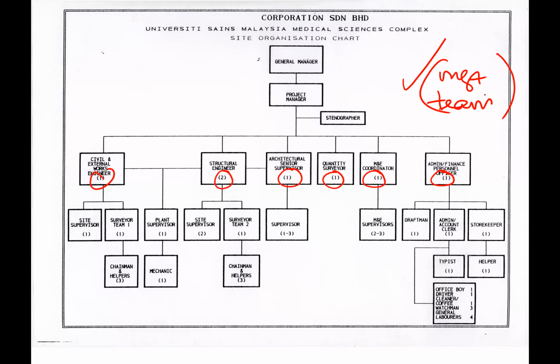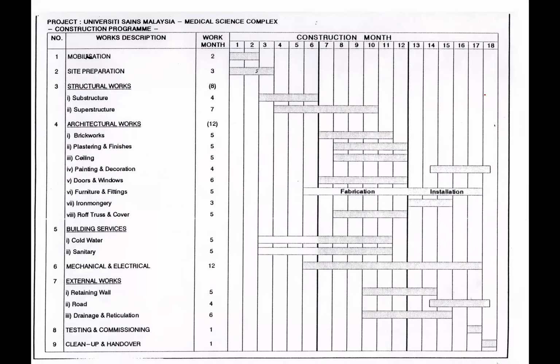Normally, management team and workers, we do separate them. Management team is not many. Normally in any construction site it could be less than 10%. Okay, the rest are the construction workers. So we separate the management team and then the workers team.